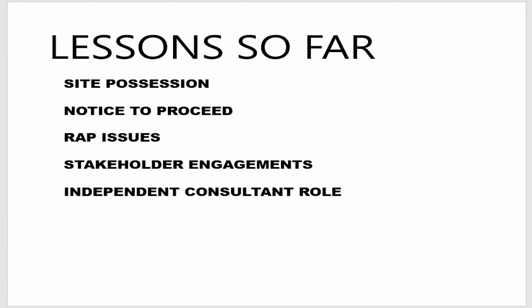How independent they are in the contracting entity is becoming challenging in the current pilot that we are doing, because the contracting entity is still moved to the traditional way of them leading the works and sub-delegating the role of the conformity manager and the consultant who is embedded, because they are more or less paid by him.